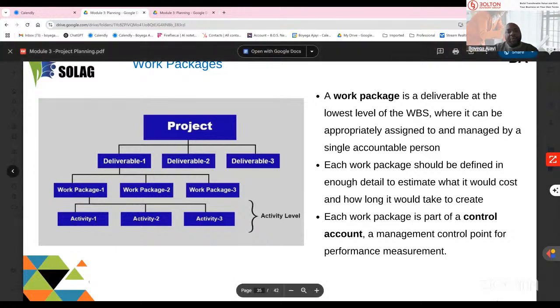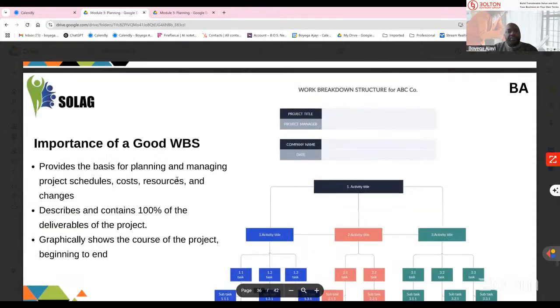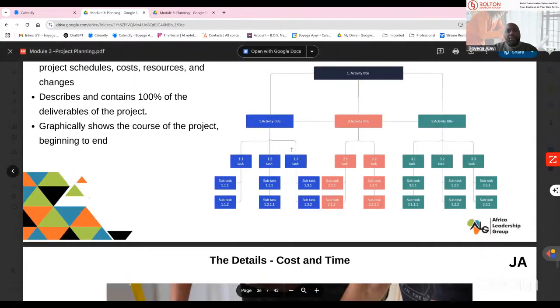And one of the things about project management is, you might just figure out the project and the major deliverables, but you don't have to be the one that gets it down all the way. You could give this to each functional manager you're working with. So in the case of the digital banking, maybe you have marketing activities, programming activities, financing activities, and you give it to your functional managers to help you decompose it. And again, this is an example going deeper.